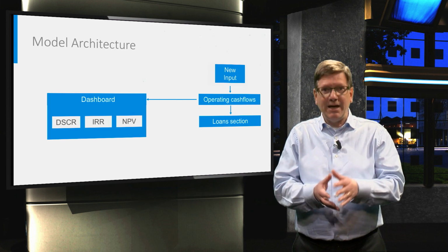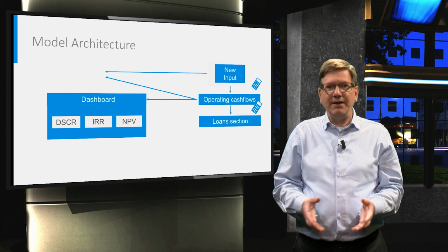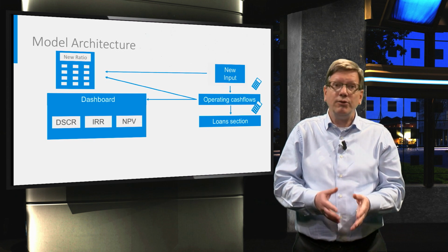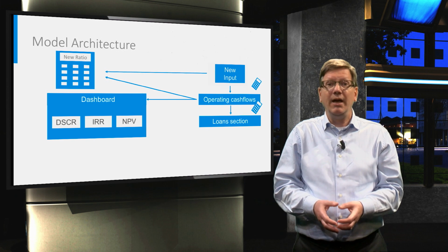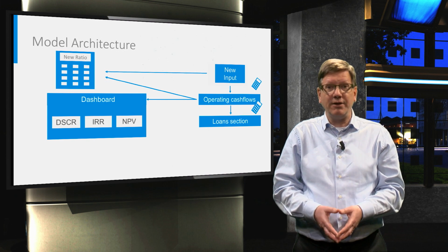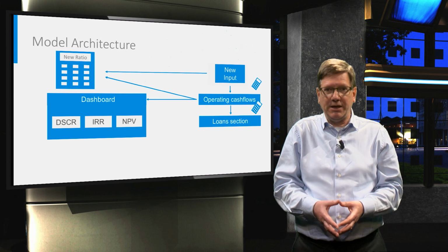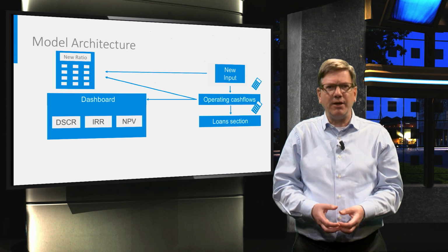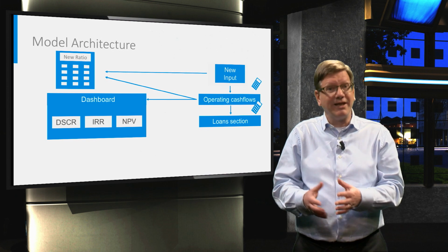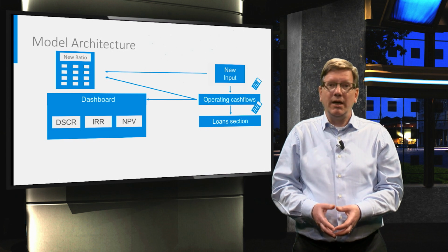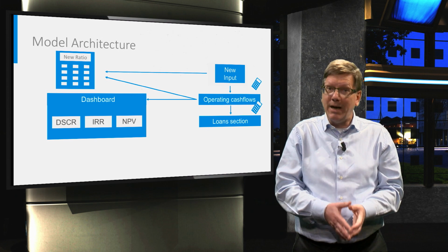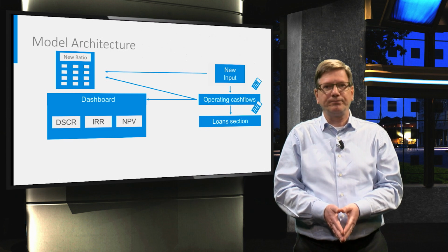The model then recalculates the cash flows and shows the resulting changes to these cash flows. In that way, the model tells us exactly what the financial consequences of the change will be. This helps us to focus our attention on the key risk areas. It also gives comfort to the lending banks that we've done our homework.